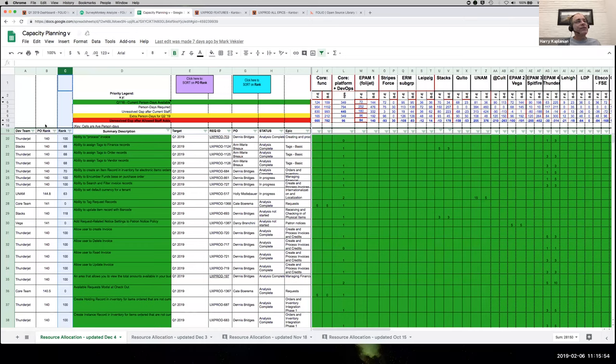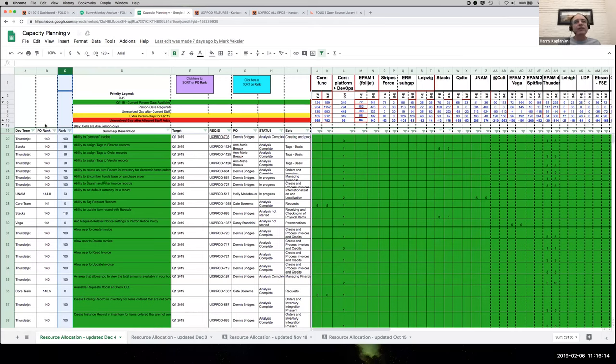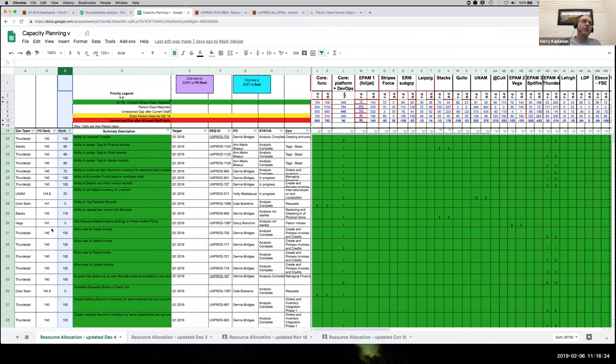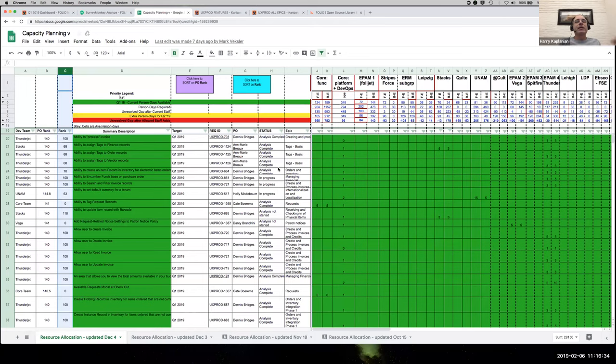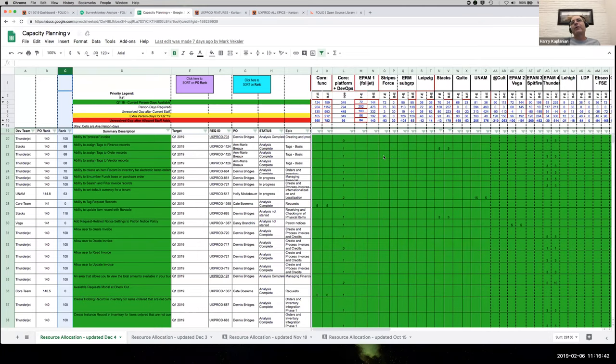Now, in those discussions with the developers and architects and other technical folks, these POs oftentimes learn their dependencies between these features. And so we try to abide by the library and librarian provided priorities as close as we can, but sometimes due to interactions or dependencies to other features functionality or even architecture within the system, those have to change a bit. And that's what we see here as our PO rank. The other thing that's really interesting about this document is in JIRA, we have estimates for all these features.